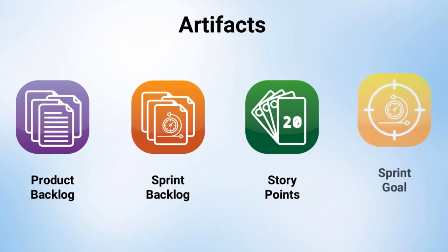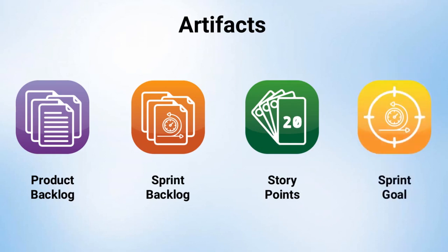The sprint goal represents the objective of the sprint's increment. The sprint goal is reached by completing the issues in the sprint backlog. A Scrum rule is that the sprint goal does not change during the sprint. The sprint is considered a success if the sprint goal is reached.